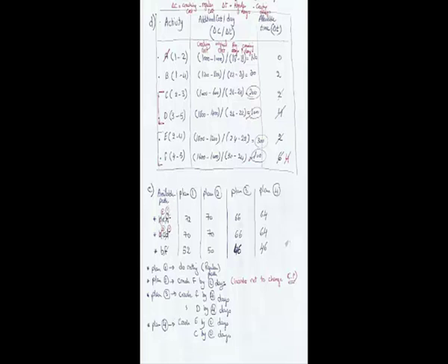Yes, we have 2 critical paths here, AEF and ACD, and A is not taken into consideration. We were considering E and F, and then C and D. We have crashed F completely and D completely, so we're going to move to the next available activities that we can crash, which are E and C.